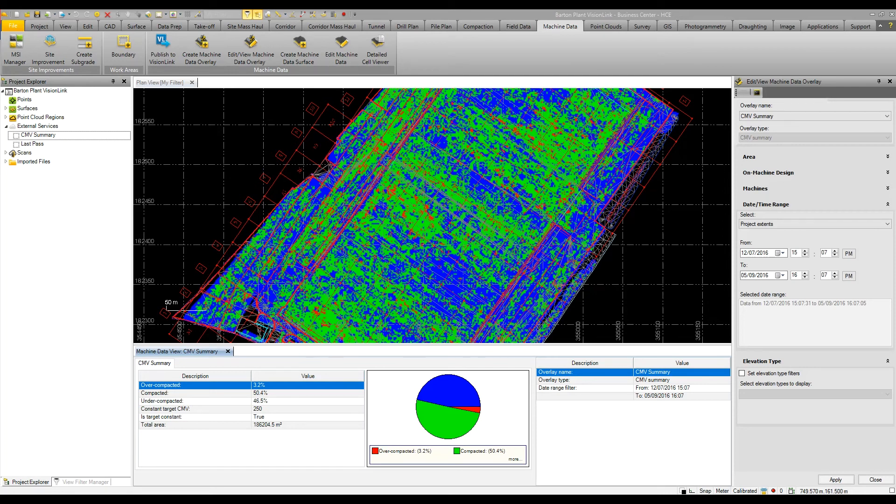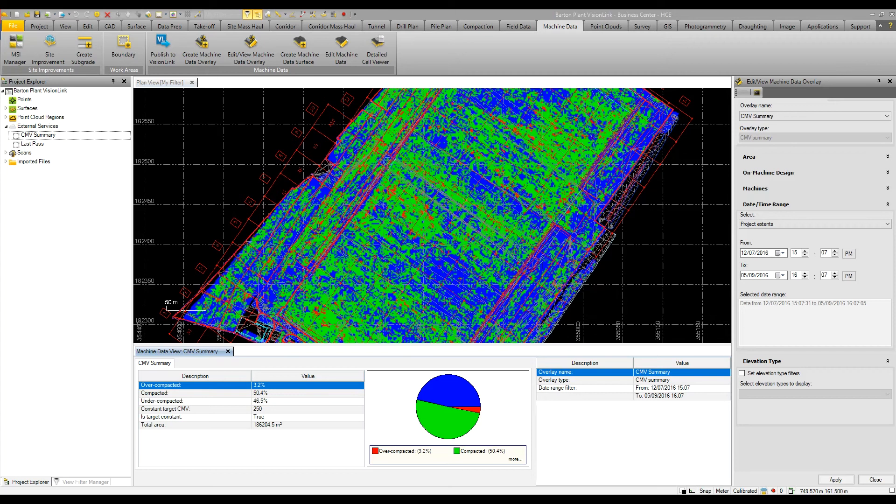Also very useful for calculating progress volumes day to day or week to week to maintain cash flow, because you do have a record that you have actually achieved some work on a job site.